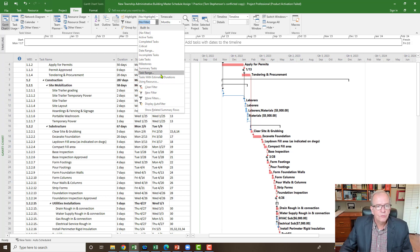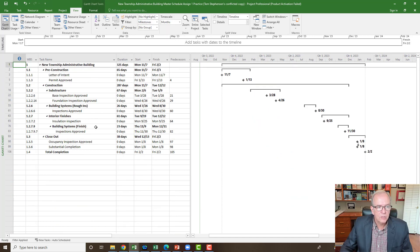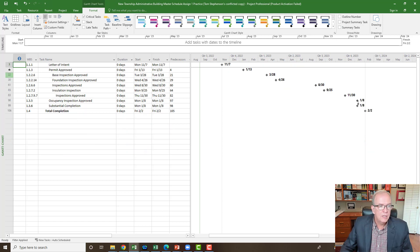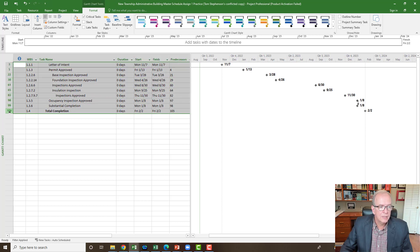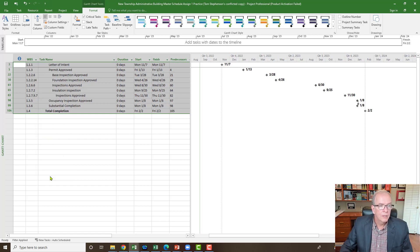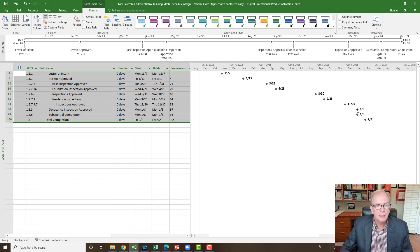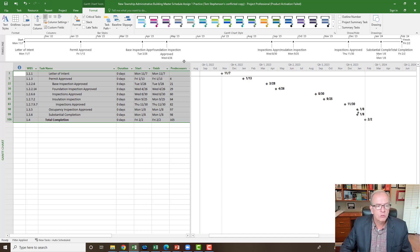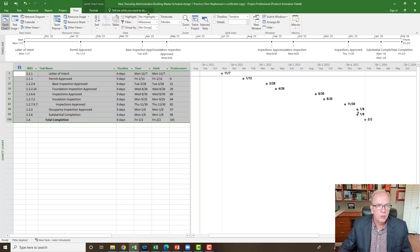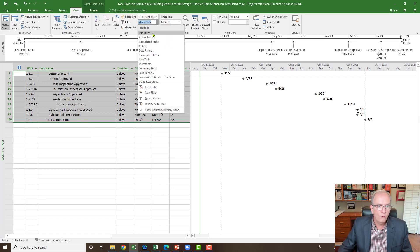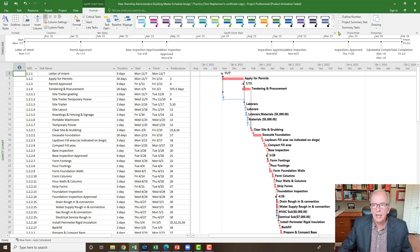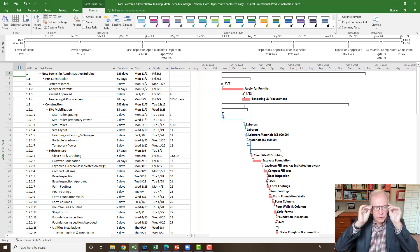OK, so other things that are very useful in here as well are milestones. So milestones, I can just say, OK, I just want to see the milestones. And right now I've got the headings. If I only wanted the milestones, remember, I can just shut off the summary tasks. And now I just see these milestones. And so this is kind of cool because I can highlight these. And I can right click. And I can go add to timeline. So now I have all of these activities on the timeline with all of the milestones in place. And I can visually see them coming up. And I can leave that on my actual screen so I can work at trying to achieve those milestone dates. And that can be really helpful in setting things up that way. So I've got the milestones. Now you have to remember, you will go to view. You have to go no filter. And now you bring it back. You go to format. And then you can bring back your summary tasks. So it's a step-by-step process of filtering.